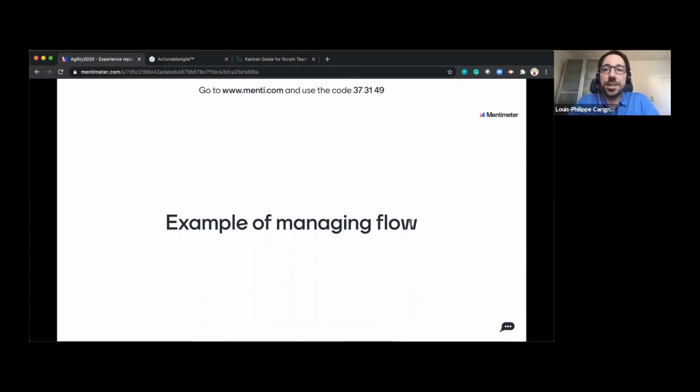Try something. Let's say, okay, let's try 5 days or less. Can we do this within 5 days or less? Or if you've got more complexity or a domain that's more difficult, maybe bump that value to 8 or 10 days or less. And it only takes you 12 data points, or 12 completed items, to then get a fairly stable value for your 85th percentile. I can send a link to Rohit after on my website. I've got a little demonstration that helps you understand that.